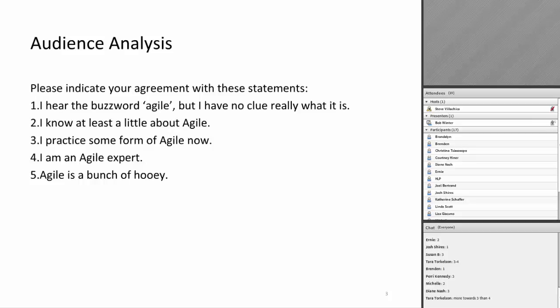If that's out of whack, if you have one group of people who are working on a 2 week cadence, delivering value every 2 weeks, side by side and interacting with a function that delivers work every 6 months, that's going to cause a problem. Or if you have another function next to you that takes longer to do things than is acceptable for your cadence of work, that can be a problem.